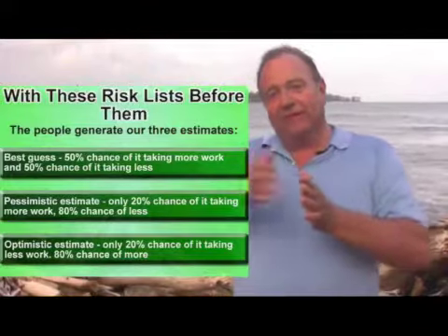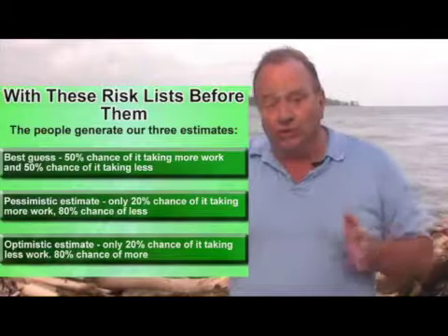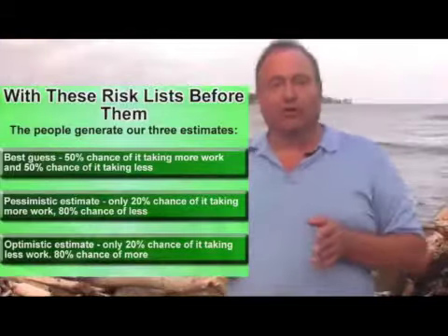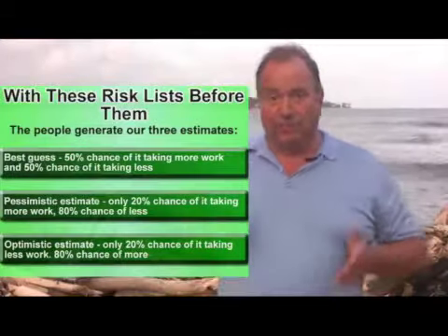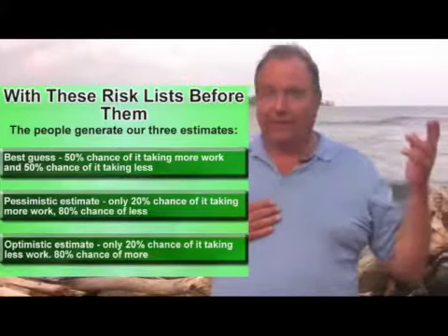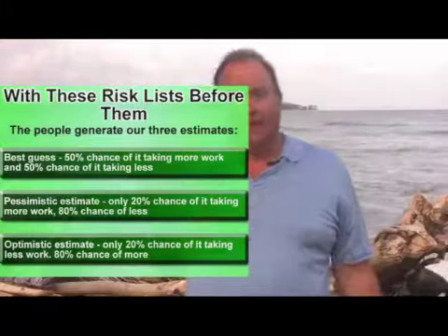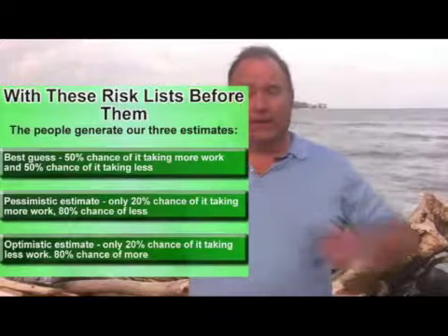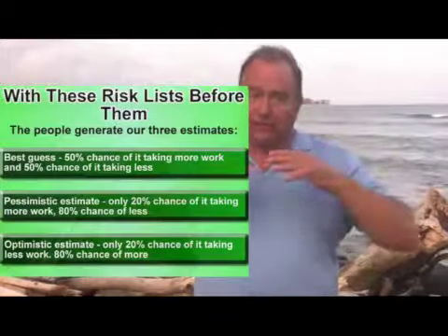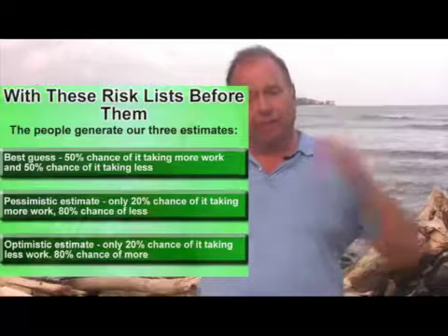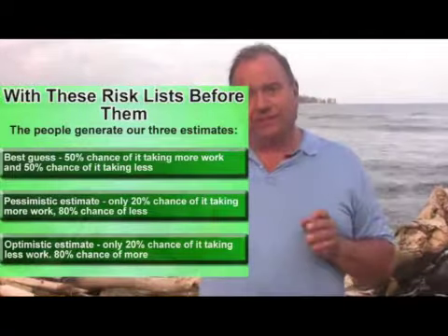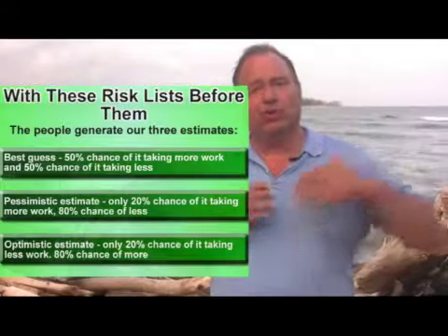So we have a little bit of what's called kurtosis, or it's not a smooth bell curve kind of distribution, and that's fine. We want people to think about what factors will make the job take longer, take more work, and include that in their estimate. So we have SWAG, production standards or parametric estimates, or PERT estimates. You'll get a chance to do all 3 of these in the assignment. And that's the way we work with our team members to develop the estimate and get their commitment to those estimates. Another technique that we use is analogous estimating.